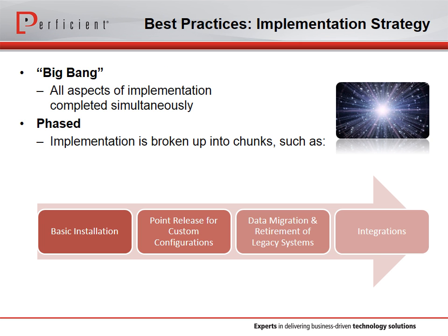Also, we found that once users begin to use the system in their day-to-day lives, they usually discover additional requirements as they use and become familiar with it. And so the big bang approach generally depletes the budget for future enhancements, or at least for a while. So the users will typically have to wait longer for these additional requirements.